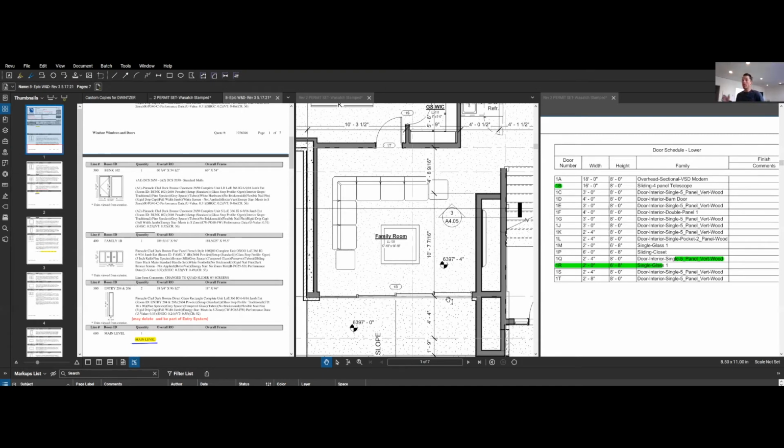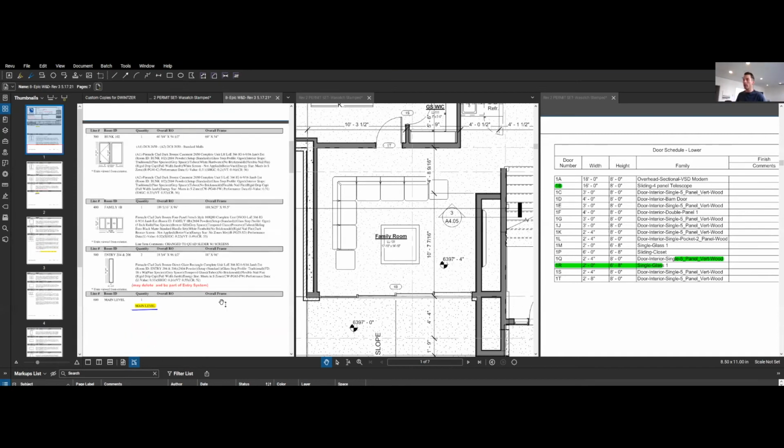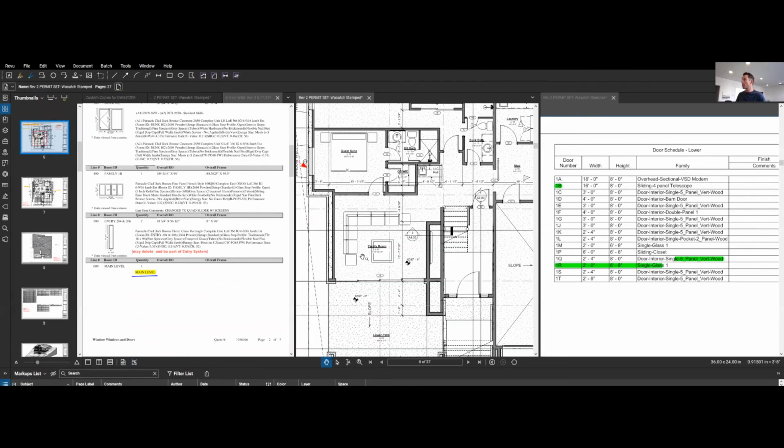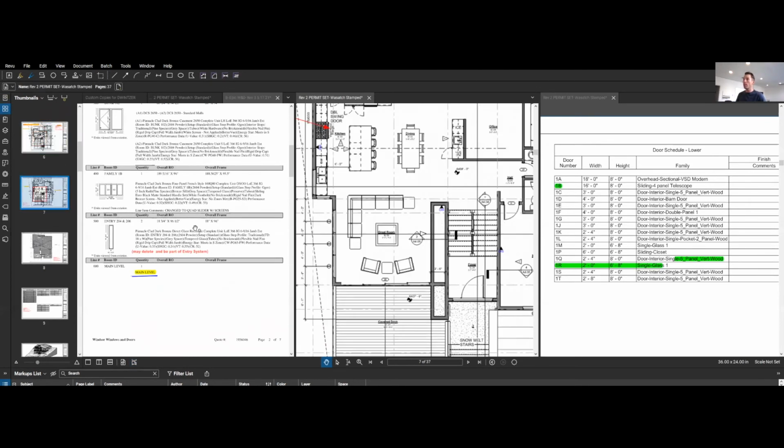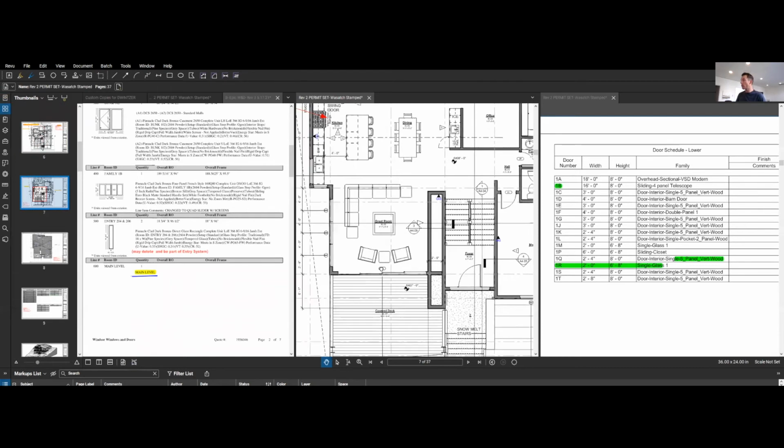And over the course of 4, 5, 6 windows that we did that, we ended up saving a good $15,000, $20,000 on the window bid. So it's good to go through this with your window guy and figure out different ways that you can save on costs when it comes to value engineering your windows. So it's pretty simple. We only had a couple windows downstairs, and then we go to the main level, and then we just go window by window.